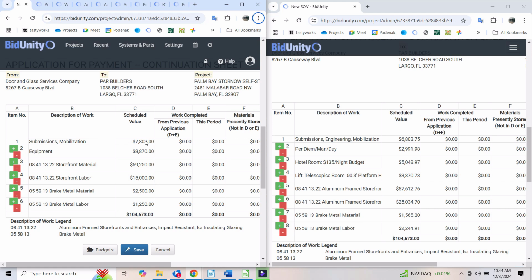That's good. I'm front loading some money. The equipment line looks like about $800 more than per diem and hotel. I'm not going to be billing the equipment line until after I'm on the job mobilized. Over here I have $3,000 for equipment, and I moved $5,000 from my hotel into my equipment. I want to get money for the hotel as soon as I can. In the equipment, maybe I don't put myself in the best position to do that.